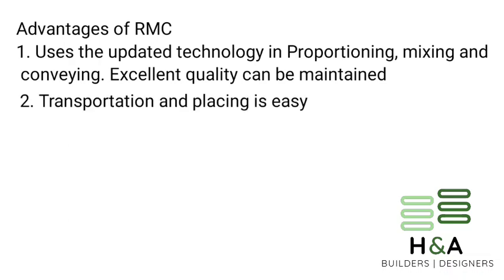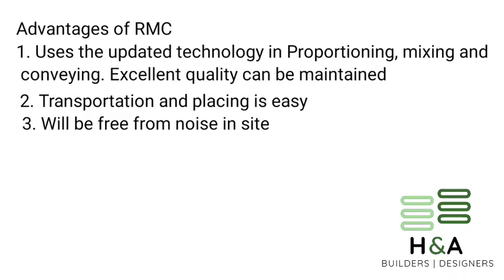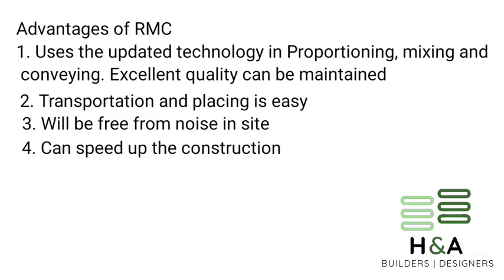The next point is that transportation and placing of concrete is very easy with RMC. Once the concrete mixer reaches the site, concrete placing can commence immediately through the concrete pumps. And the next point is that concrete production and mixing is done in another place, that is in the batching plant, so the site will be free from noise, dust, pollution and free from raw material and cement stocks. By using RMC, the construction speed can be enhanced and schedule delays can be avoided up to an extent.